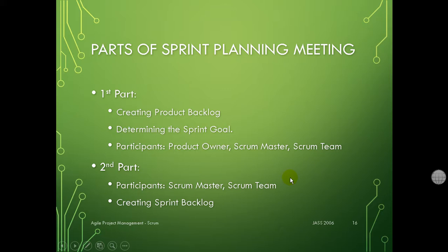But there are other important points in backlog items. In these items, you need to have a weight. They need to have a weight. Weight for what? You need to have a number assigned to every item that says how much effort that item would take. How much time would it take to be accomplished?